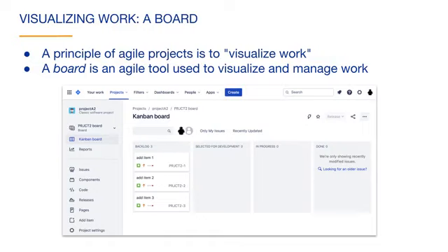This board contains 3 issues, and they are all currently in the backlog column. As the team works on issues, they move the item to the next column until the item is in the done column. You can see that a board is like a 2-dimensional to-do list. The extra dimension is used to allow a work item to go through multiple steps before it is finished. Agile teams commonly break up the project into manageable issues and work on them in steps like this.